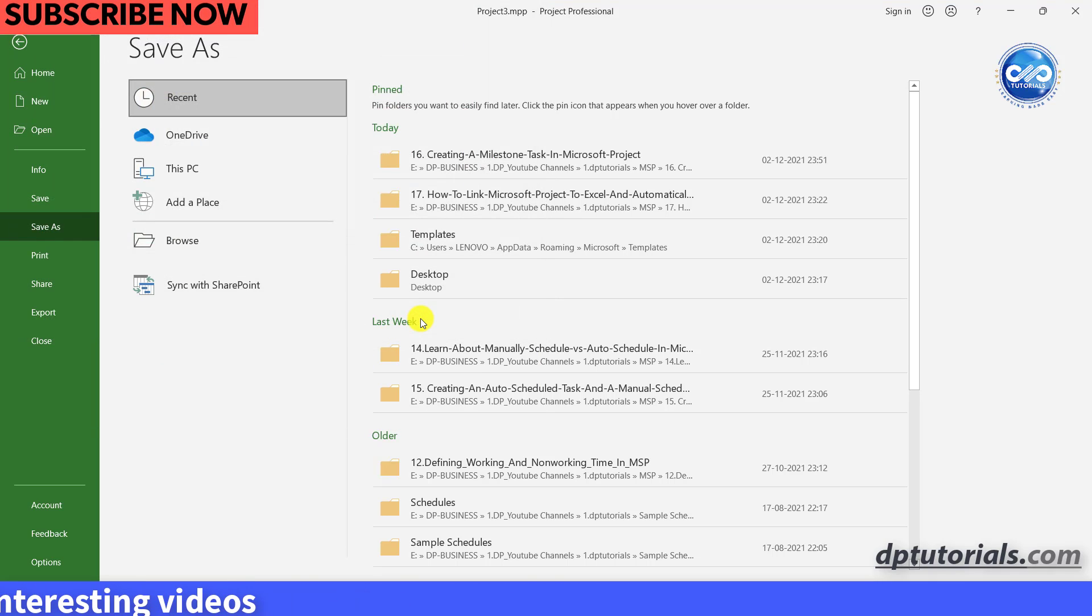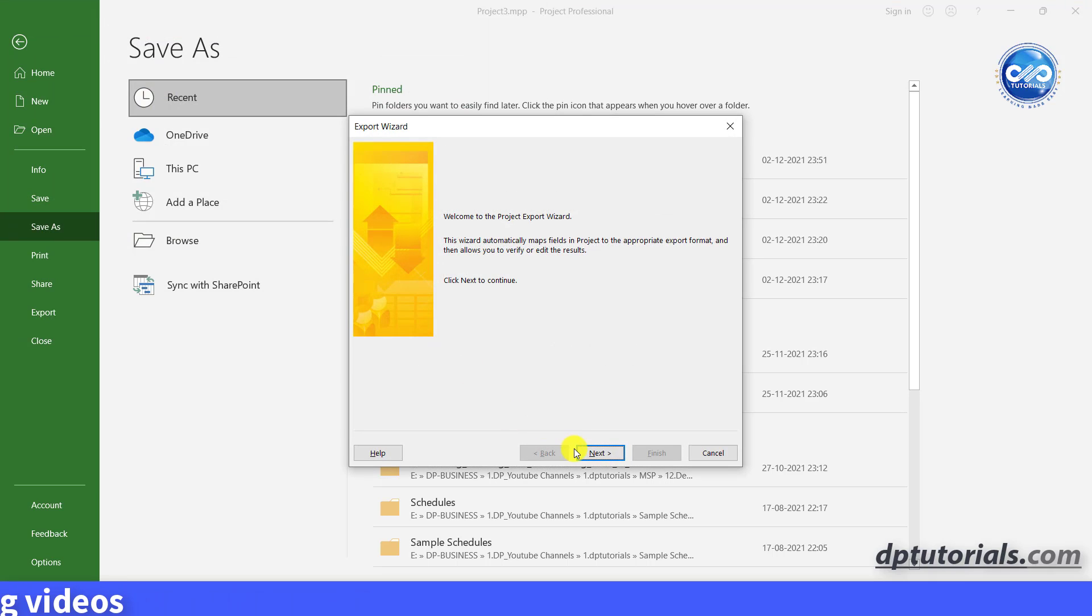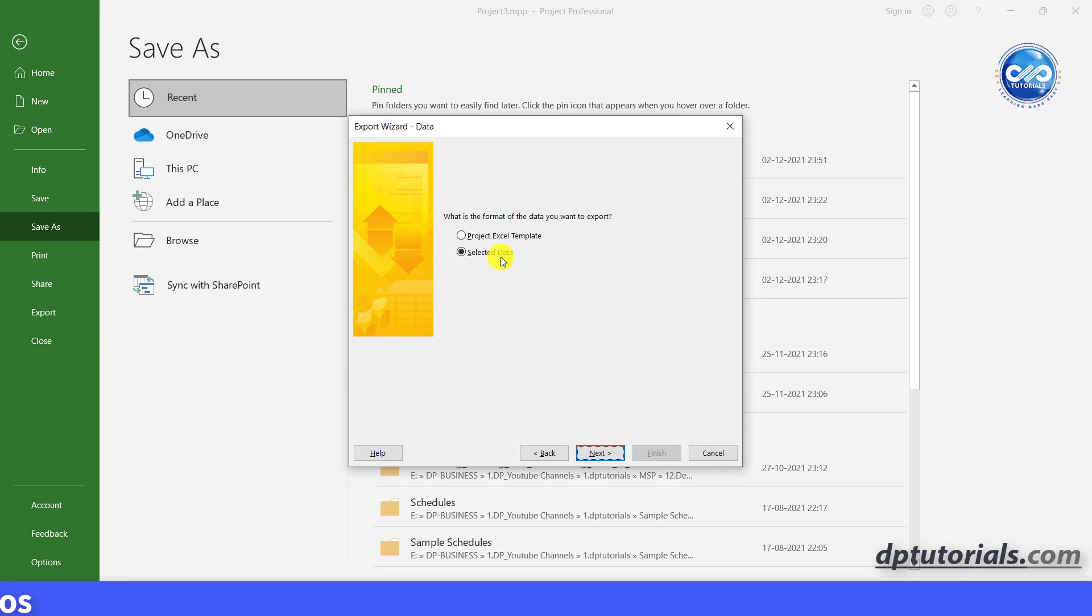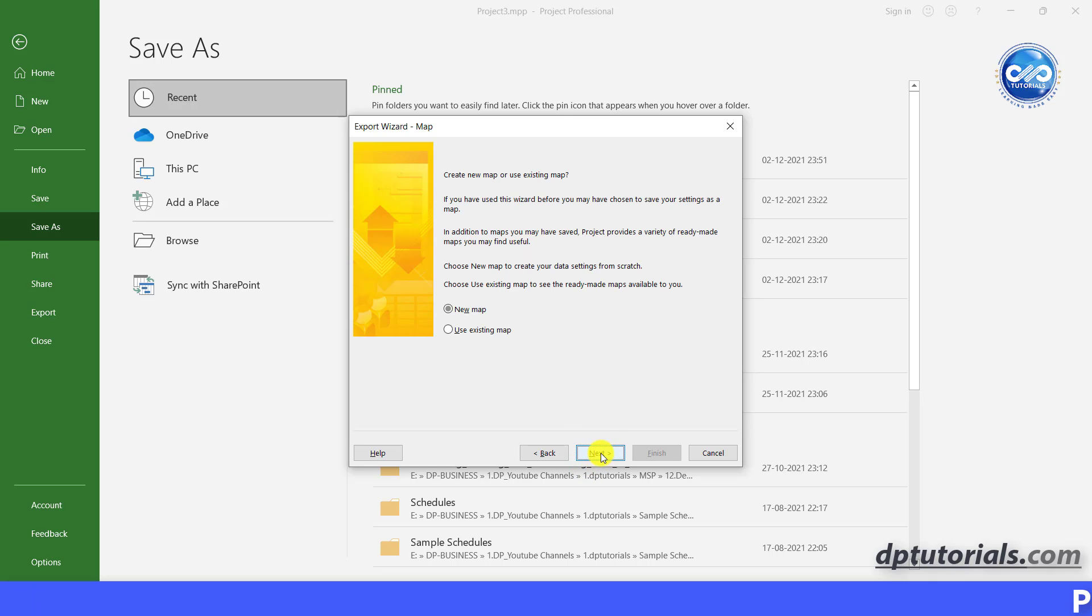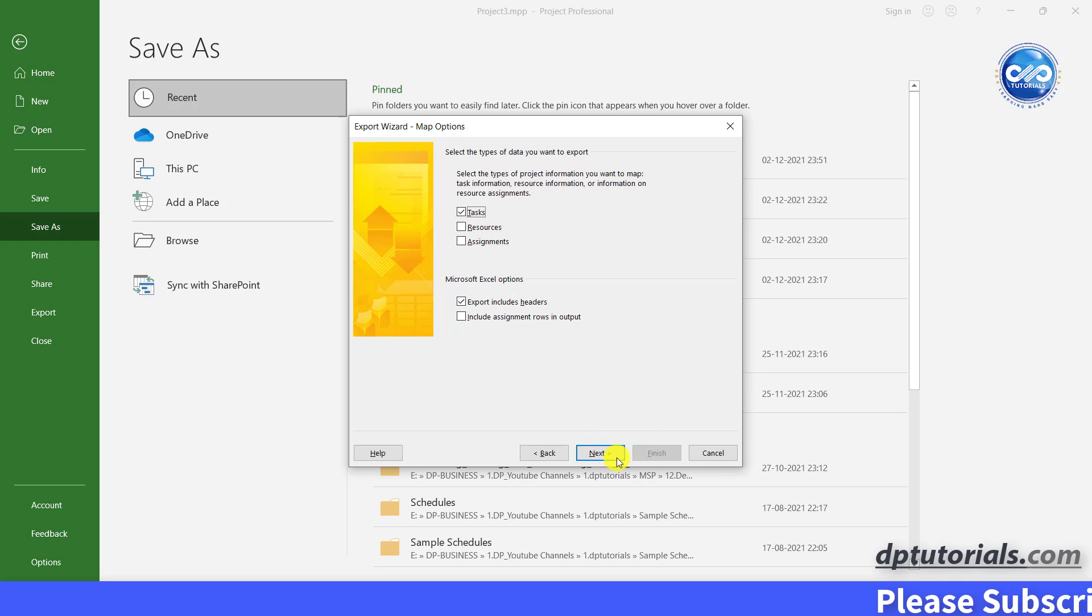This is the export wizard popping up, click next, then select the selected data option, click on next, select new map, click next, select only tasks as of now, as I would like to export only the task.